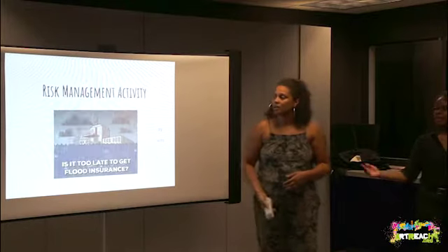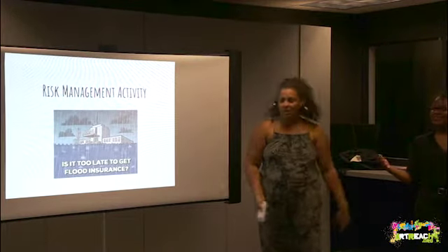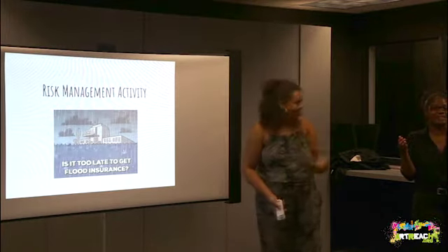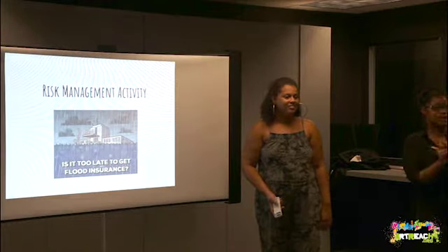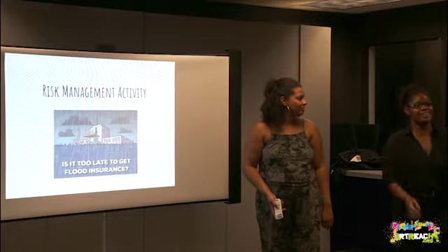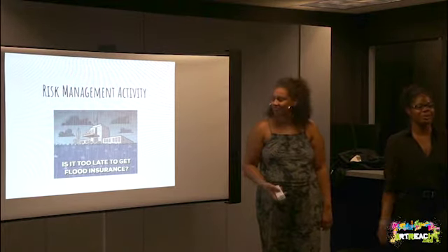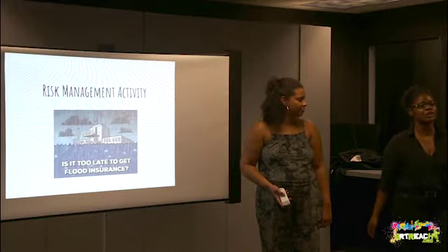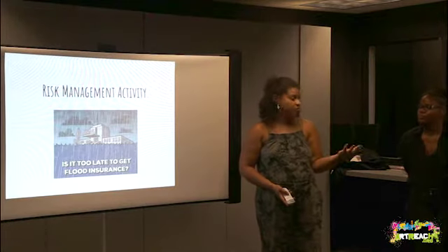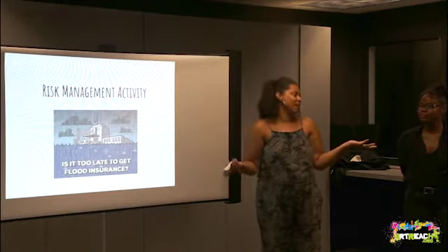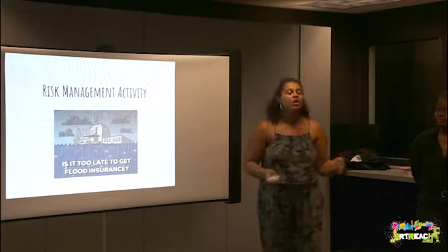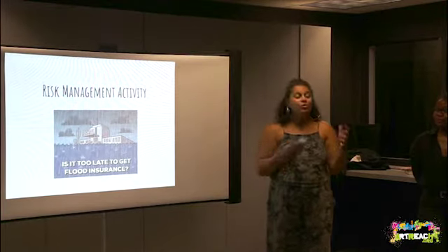I would also add positive risks. I like doomsday thinking, but also positive risks. You could get more money. What if more volunteers show up and actually show up? Or what if someone donates equipment? There are positive risks that can happen where people want to support your project, and you can think about those as opportunities. And you also want to plan for them, because what if you have more volunteers and you don't have enough things for them to do? Or your manager says, whoa, we only have 6 on the list, now we have 10, where am I going to put them? You have to plan for those as well, but those are great things to plan for.